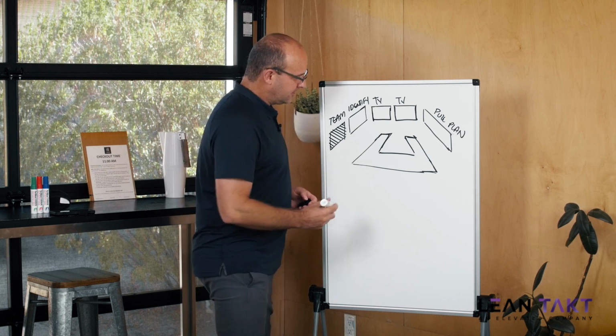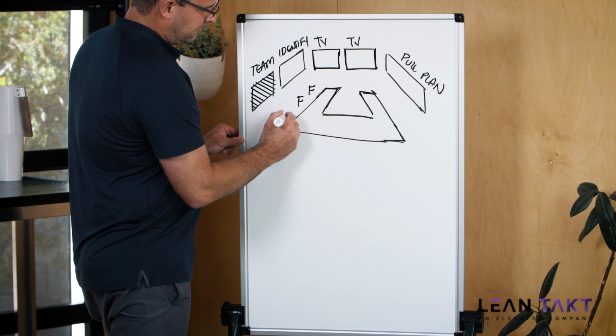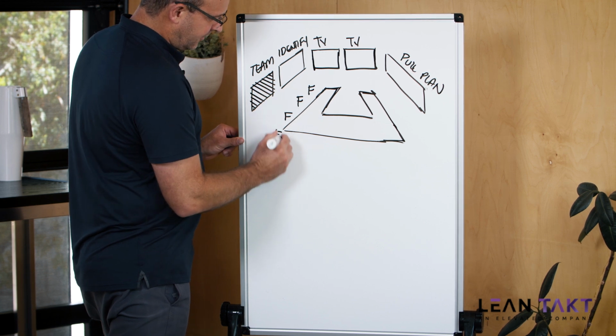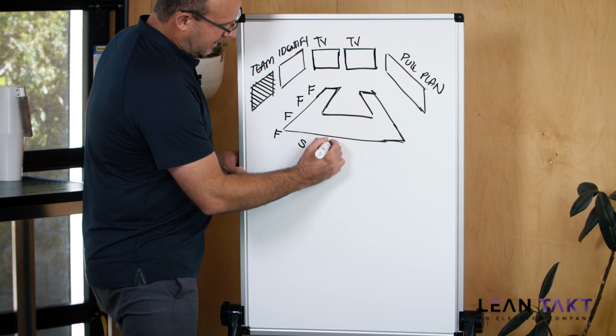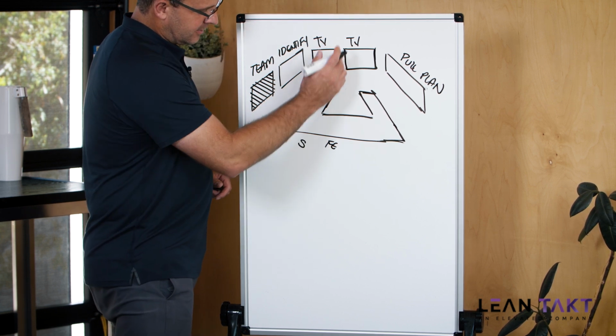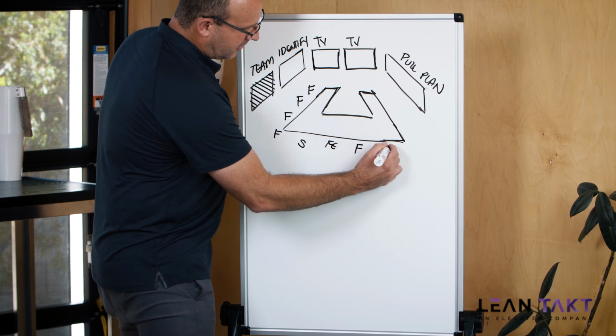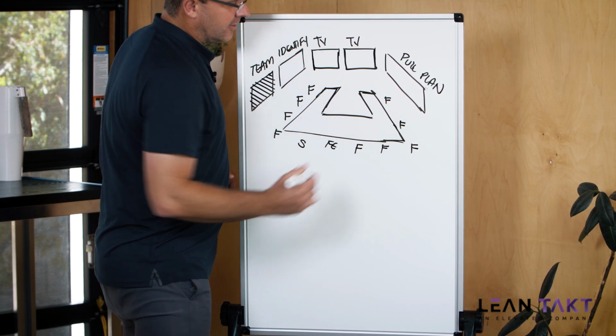Let me talk to you about who's there first and foremost. You will definitely have the foreman for your trade partners around the room. Typically the superintendent and the field engineers or assistant superintendents will be in the back so they can run the screen, but the foremen are around your conference room table and we have a jamming time.